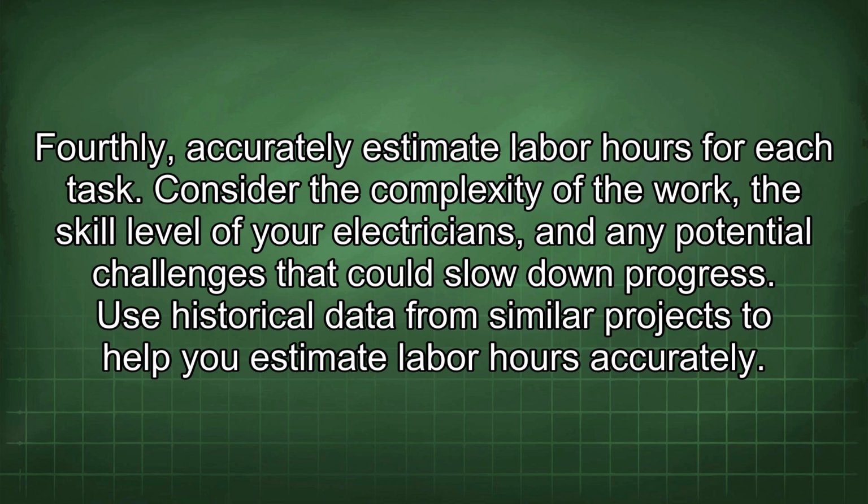Fourthly, accurately estimate labor hours for each task. Consider the complexity of the work, the skill level of your electricians, and any potential challenges that could slow down progress. Use historical data from similar projects to help you estimate labor hours accurately.